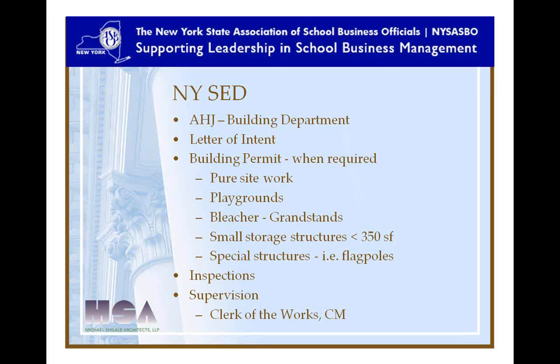We try to group work by trade or contractor, so we would group roofing work together on a number of different buildings, or flooring work. And you get some benefits there in terms of economies of scale, bidding out a larger project and reducing the costs. There's a benefit as well in that a number of your schools are getting some significant dollars, and you can get some broader community support if all your elementary schools are getting a certain amount of money, and the communities and neighborhoods around them are happy that their schools are being improved.